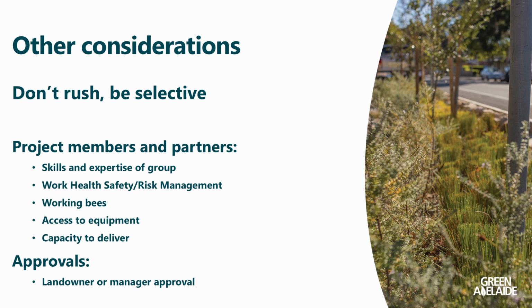And thinking about your capacity to deliver. So again, if there are some components of your project that are beyond the capacity of your group, then certainly contractors or consultants you can get in to do that. And the final thing on this slide here is obviously landholder or manager approval. And this is a really important component, and the application form for the grant does require evidence that you have sought and have approval from the land manager.